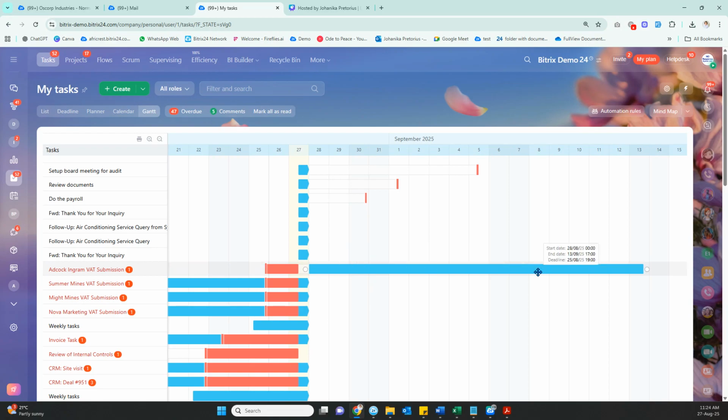So I clicked on that task, and then I've got two things. I've got, when am I supposed to start with this task? When am I supposed to be finished? And I've got a deadline itself. I can move that deadline over there. So for time-wise, so when am I planning? I'm going to start this task. I want to have it done by then, and I have a deadline. So that's the specific thing where you will use your Gantt view to see what's happening.